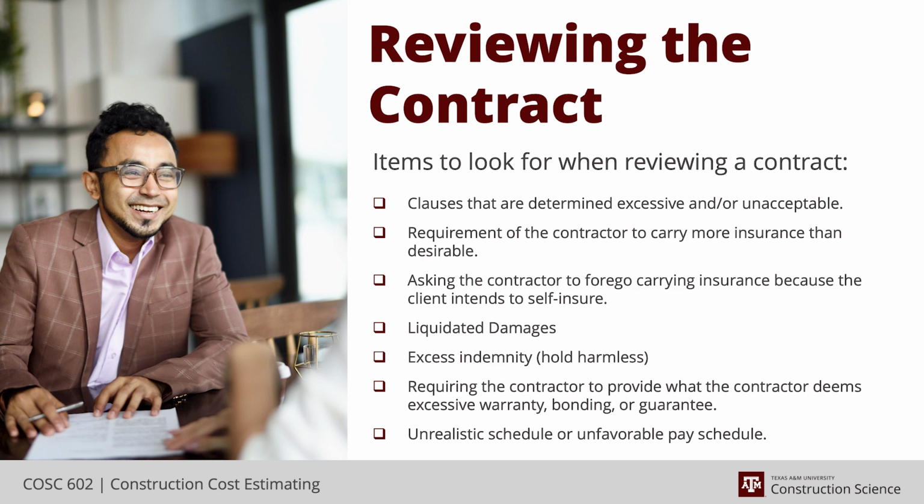The opposite of that is asking you to drop your insurance because it's an OSIP. An OSIP is a program where the client self-insures the project. Clients have, and I've had this with the large multi-100 million plus jobs and the small $2 million, $5 million jobs, claim it as an OSIP and want us to drop all of our insurance costs. That way they get the bid down from everybody.